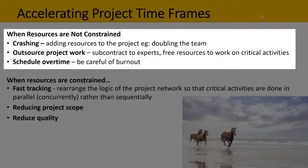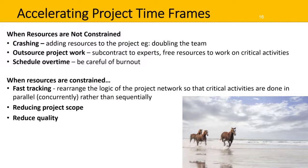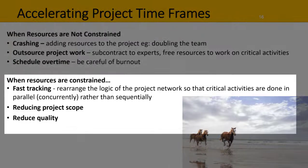You might also schedule some overtime, but be careful of burnout in the project team. When resources are constrained, you could try fast tracking — rearranging the logic of the project network so that critical activities are done in parallel or concurrently rather than sequentially. You might also try reducing the project scope, so doing less, or reducing the project's quality — for example, perhaps doing one less round of testing.